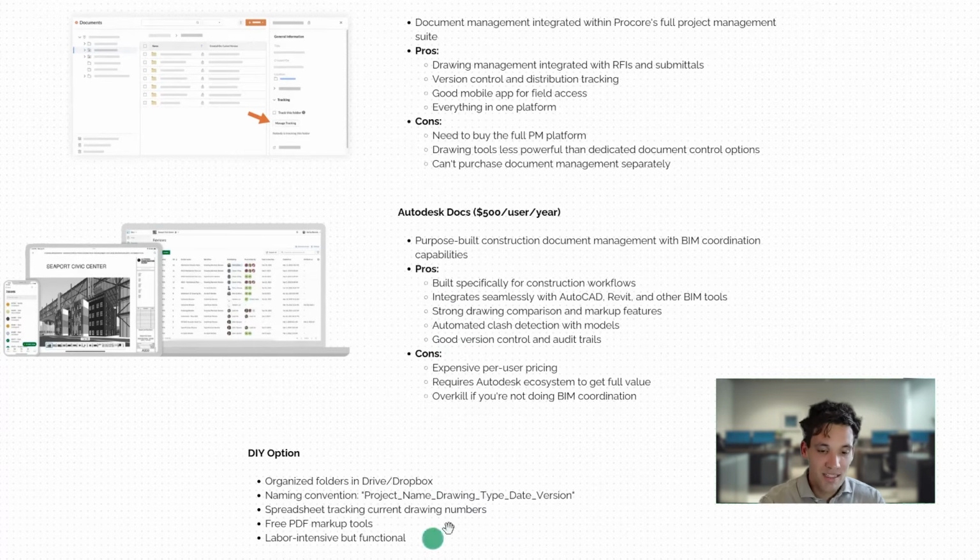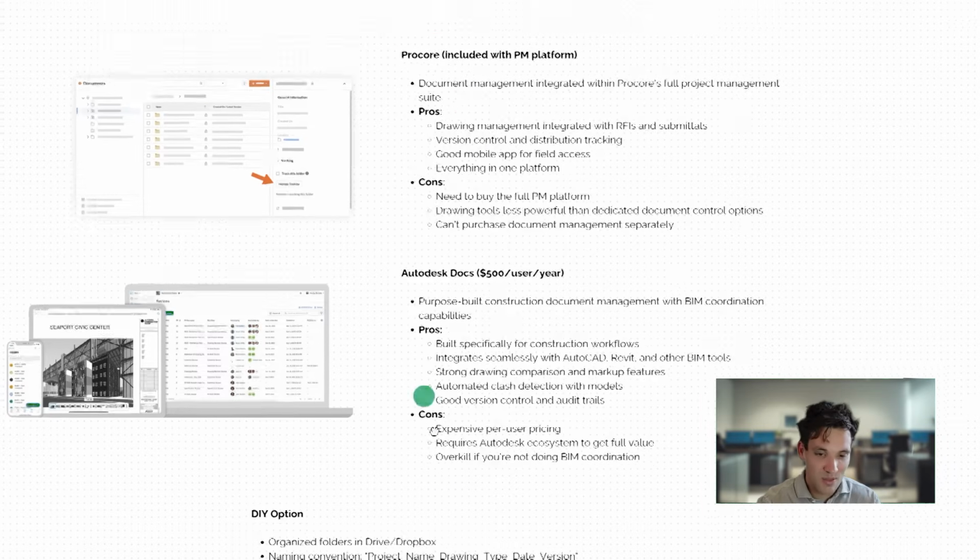The key here is I just really think through how you're going to set it up at the start of the project and set it up properly. So you could use SharePoint, you get a folder for each drawing package, you can have each individual drawing listed out and have some sort of process when you get a new drawing that someone has to go through and up-rev it. All that stuff you have to think about at the start of the project.